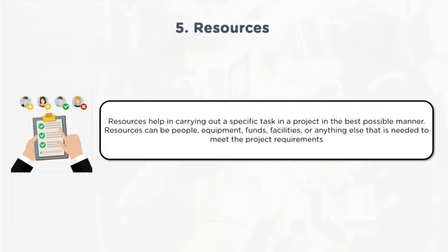So it is very important for a project manager to understand these dynamics of human resources and manage those conflicts. A project manager cannot shy away from handling conflicts. The project manager has to handle and resolve those conflicts in favor of the project, not in favor of any individual. There are various techniques for resolving conflicts: compromising, problem solving, smoothing, accommodating. Whichever helps for that project scenario and the project objectives needs to be applied.